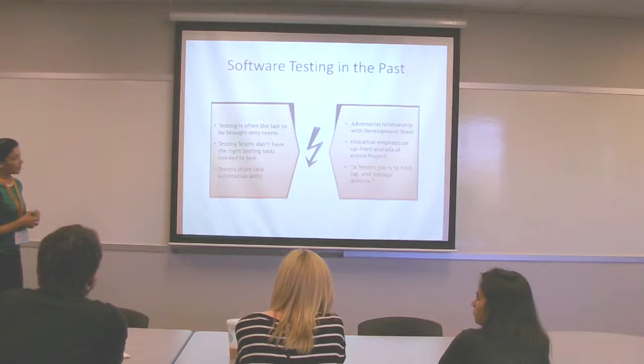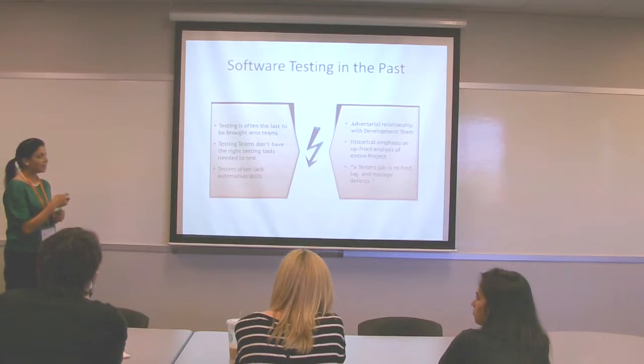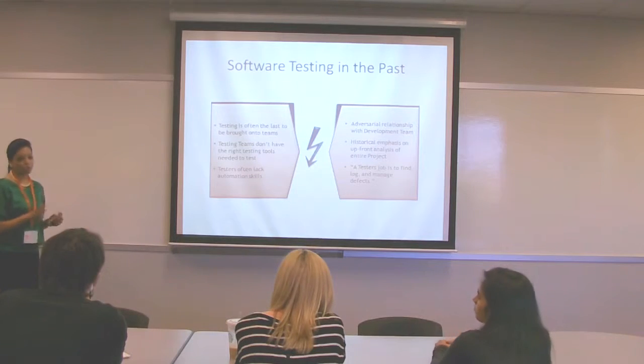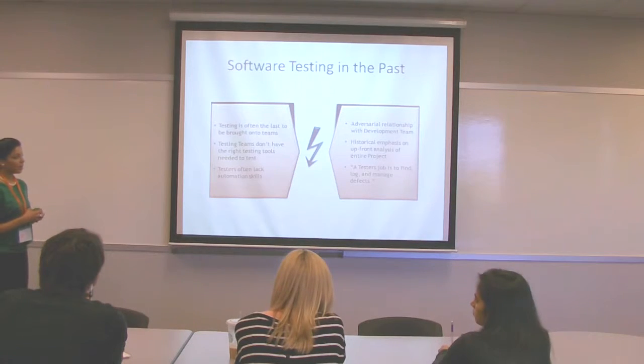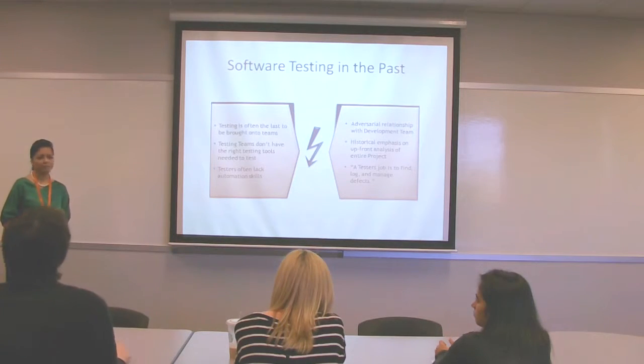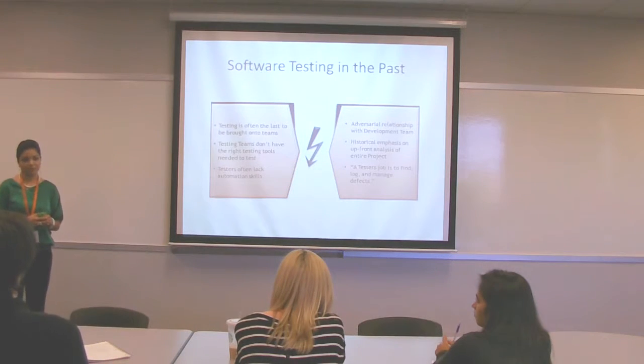So, to break this, what I suggested, and I think it sort of worked, is let's try deploying twice. Then after a couple of iterations, we'll try deploying 3 times. So when we say twice, in every iteration we are planning 4 stories or 6 stories.